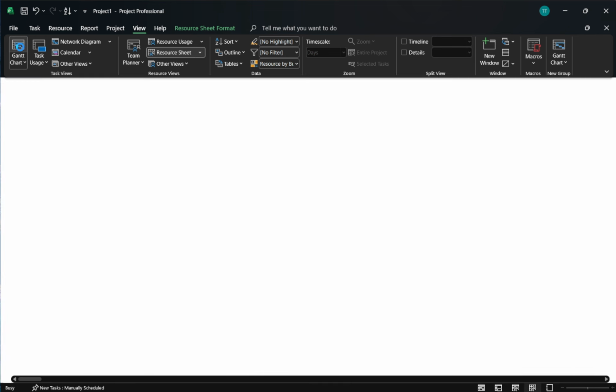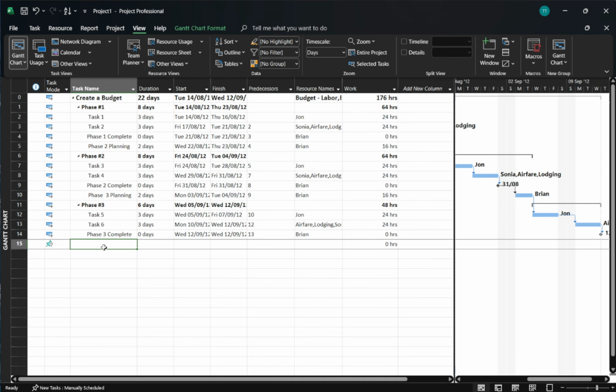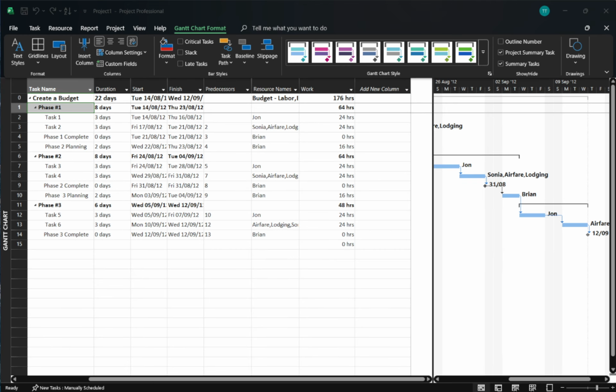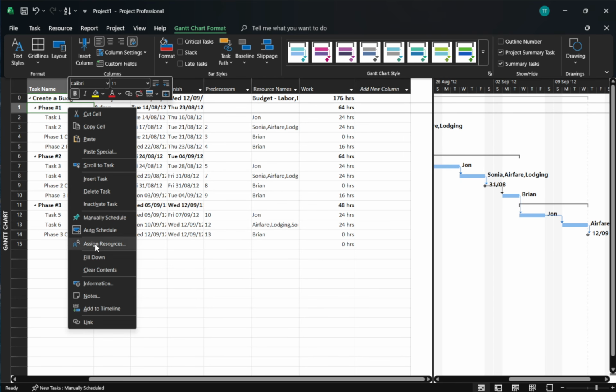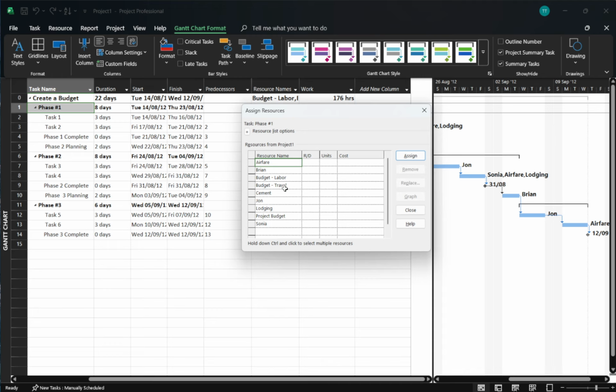From here, your total budget appears at the top on the summary task. As your team records progress and costs, you can compare budget cost to actual cost to see what you've spent, and to planned cost to check whether you're on track. If your currency or formatting looks off, remember, it follows the project's currency settings. That's it. You've set up a true budget in Microsoft Project the correct way, ready for reliable tracking and reporting.